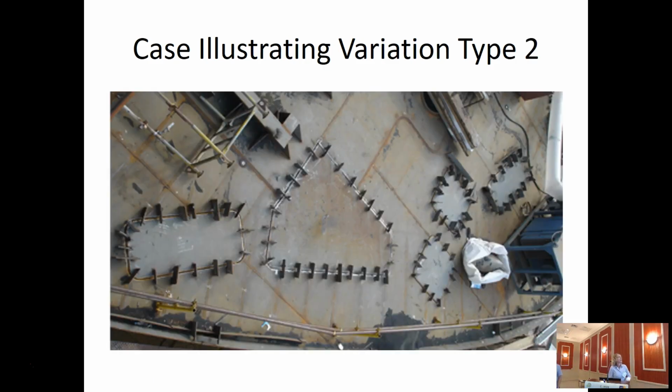Thank you. Okay. I talk about the variation type 2, which we call low probability, high impact changes. It's difficult to anticipate ahead of time. We observed this mainly in the advanced shipbuilding industry, and it relates mainly to technical changes in design specifications, because both the operations of the vessels and the building of the vessels are on the edge of known technology. So changes in design and technical specifications are an inherent property of this business. It's obvious that such changes are difficult to handle by buffering strategies. Why? Because changes in design may change the project network structure itself, not only the duration of an activity, which can be handled by a buffer, but also the activities to be performed and their sequencing. So this is a much more complicated problem than only treating uncertainty in project activity durations.